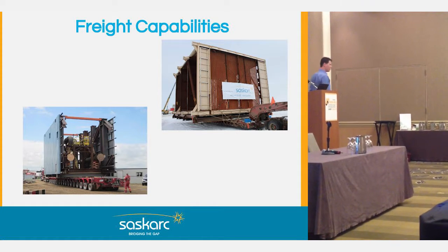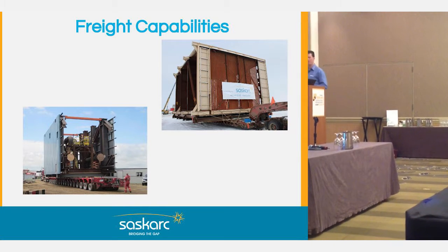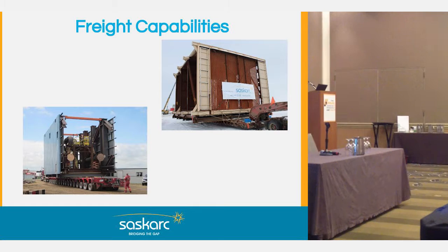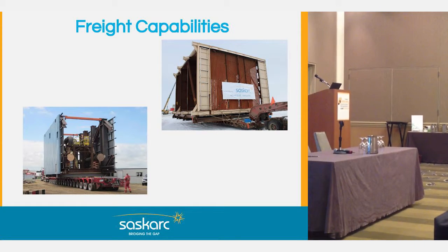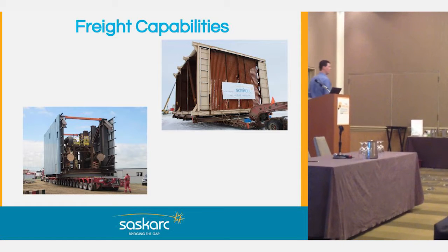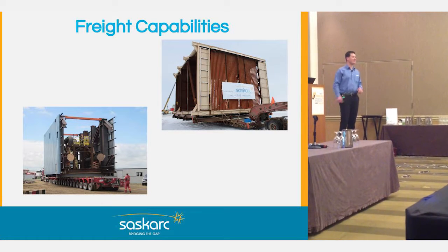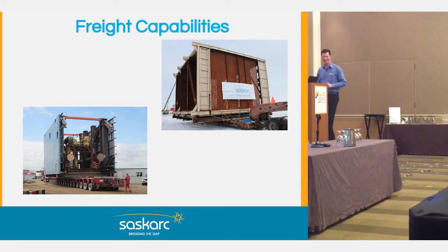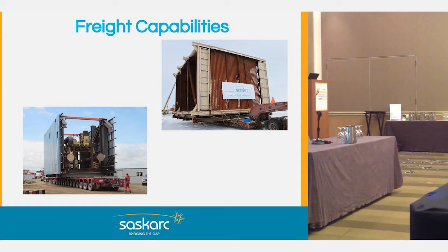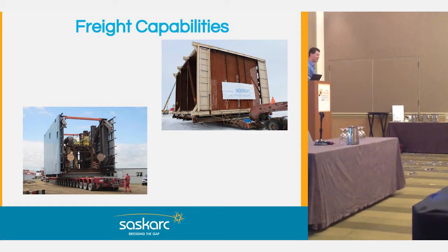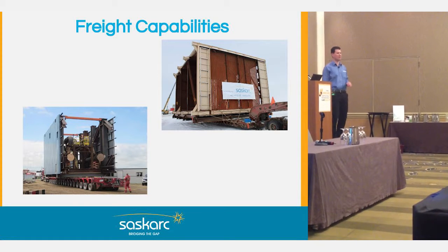And as a fabricator, we work very closely with the freight companies during the preliminary stage. If route survey is required, if we need to work with the government bodies or local authorities to ensure we can ship it, we facilitate that, because as I'm sure everyone in the audience can relate to, you don't want to get a project half built and then find out it can't actually be shipped. That's not good. So early on in the phase, we will work with our freight vendors to go out and ensure that it can be effectively and safely shipped.